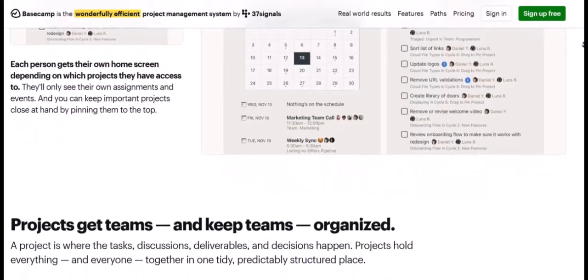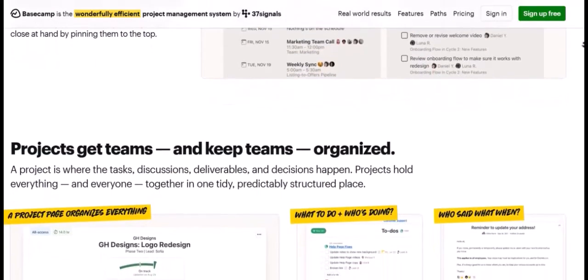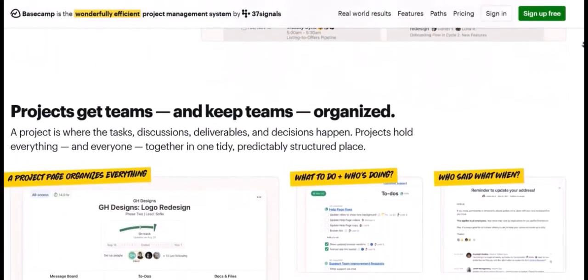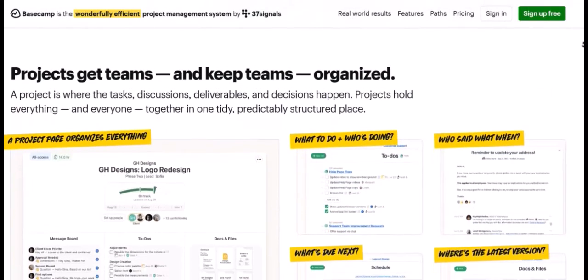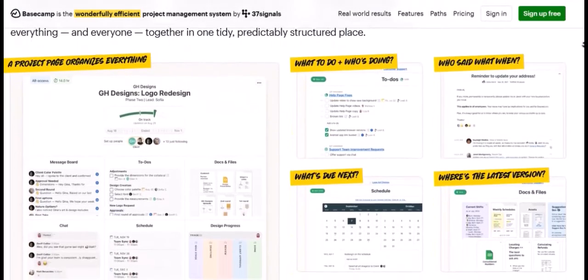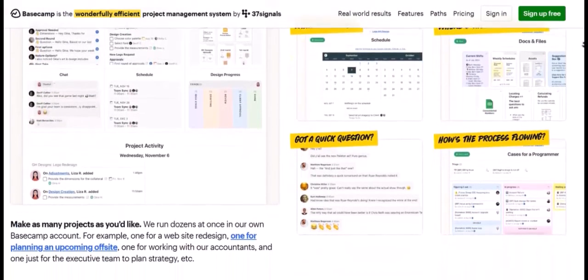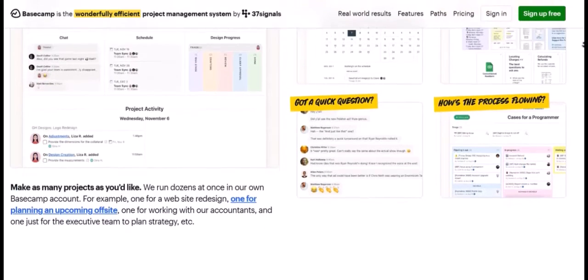Step 4. Add tools and content. Basecamp will then present you with an empty template structure, similar to a new project. Now you can start adding to-do lists. Create your standard to-do lists with all recurring tasks, subtasks, and descriptions. You can assign these to placeholders if you don't know the exact team members yet, or to specific team members if they are always involved.